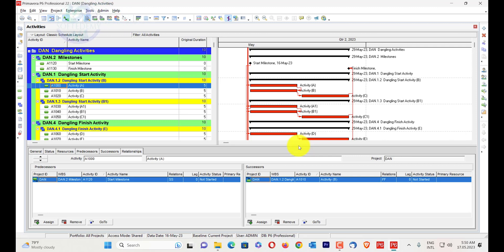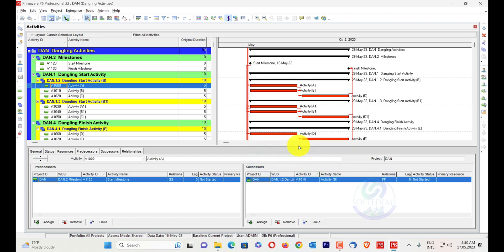What are the impacts of dangling activities? Dangling activities can significantly impact the Primavera P6 time schedule of a project, leading to inaccuracies that can potentially result in wrong critical paths and inaccurate milestone and completion dates. Delay or expedition of a dangling end will not impact the project because it is not linked to the workflow sequence, which can lead to fake results of the expected project completion date or critical path.